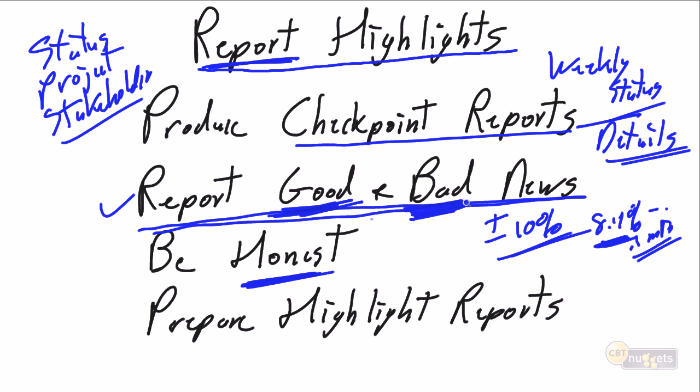There's some bad news, and I don't want you to be surprised if that 8.1 becomes an 8.5 next week, and then becomes a 9.4, and within a month it's going to become a 10.5, in which case management by exception says I need to be producing these exception plans and take them to your attention for future action. So as much fun as it is to produce the good news, be prepared to produce the bad news, and bad news may mean it's only 8.1, and bad news may be that I think I can resolve this, but report the bad news.